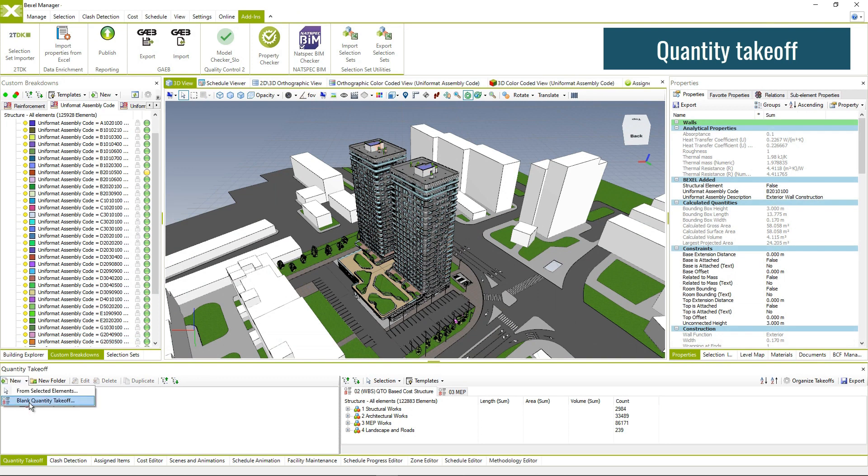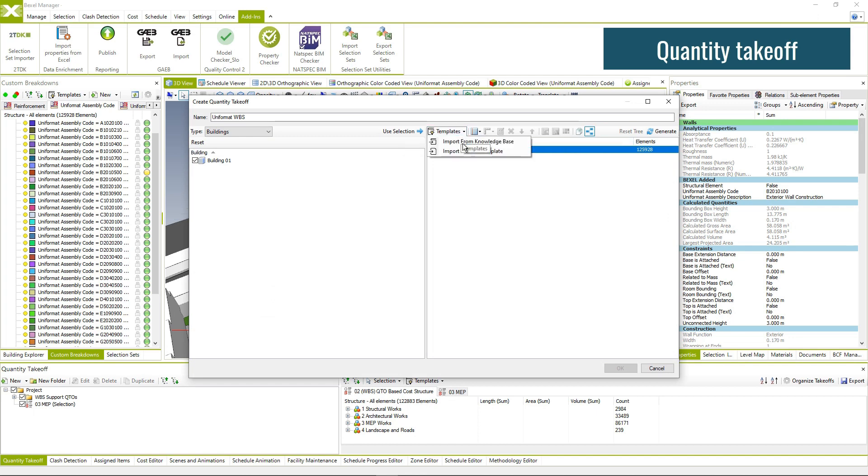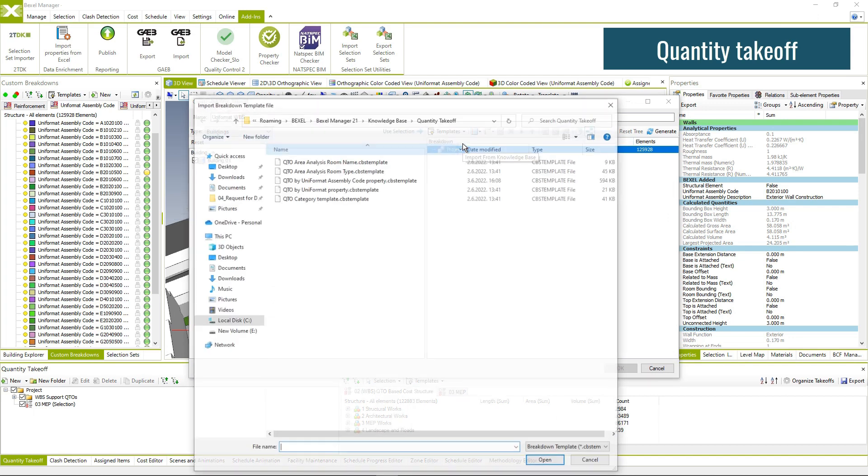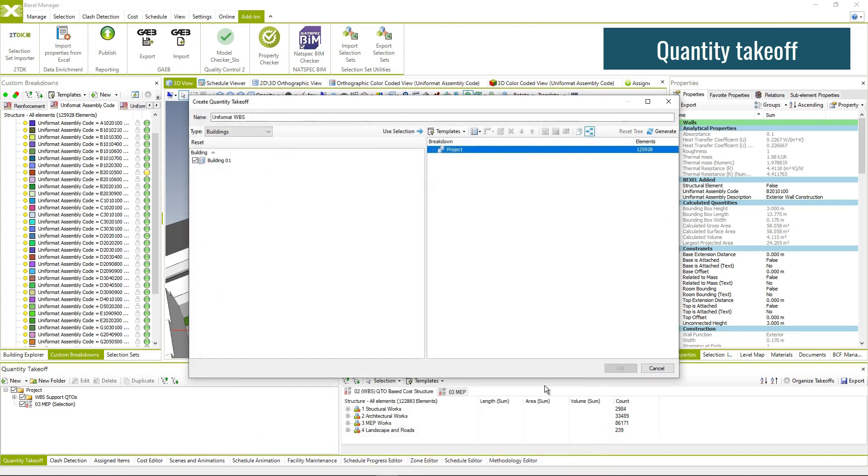Create or import a template from the knowledge base and generate quantity takeoffs based on element properties and use it as a base for the work breakdown structure for cost classification.